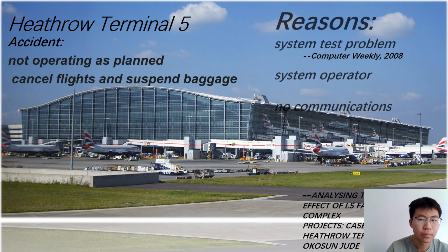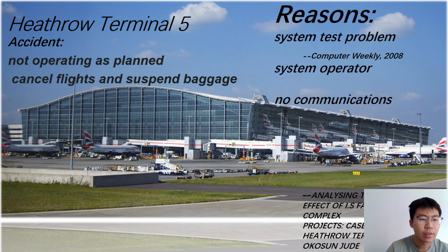And for the reason, British Airways boss Willie Walsh also mentioned the lack of server capacity that worsened the case. Apparently, the system was frozen due to the number of generated messages from the baggage handling system (Computer Weekly, 2008). This goes to show that the testing phase did not test for a worst-case scenario to know the actual capacity of their servers.